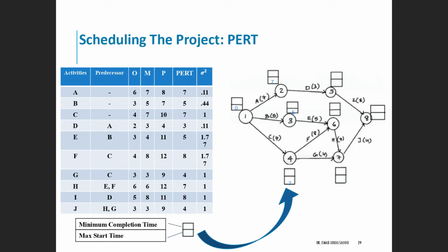Now for node 6, for example, I have the value of 5 plus 5 is 10, but also I have 5 plus 8, which is 13, that comes from the node that is here, F, which is 8 and 7. 8 and 7, sorry, 15, not 13. 8 and 7 is 15, or 5 and 5 is 10.